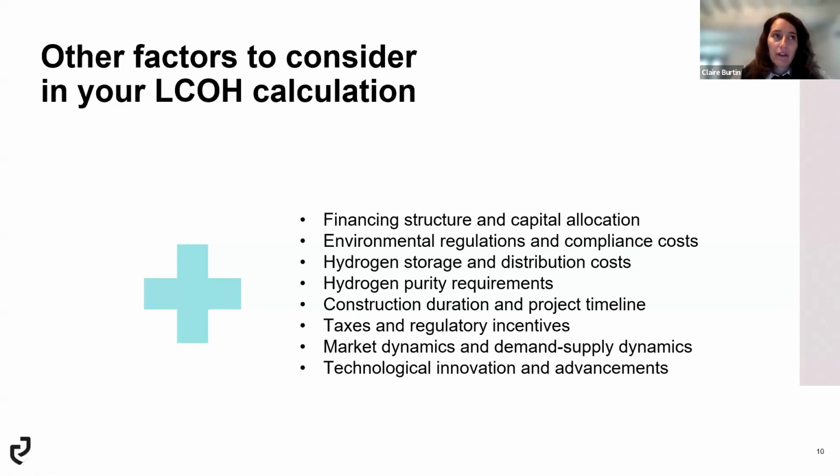These can also affect your LCOH, in the sense that LCOH ideally is going to account for the time value of money. So the longer your construction duration takes, and depending on the project timeline and when you're going to make the investment for your equipment, this can affect your LCOH calculation as well, and the true cost of your hydrogen.